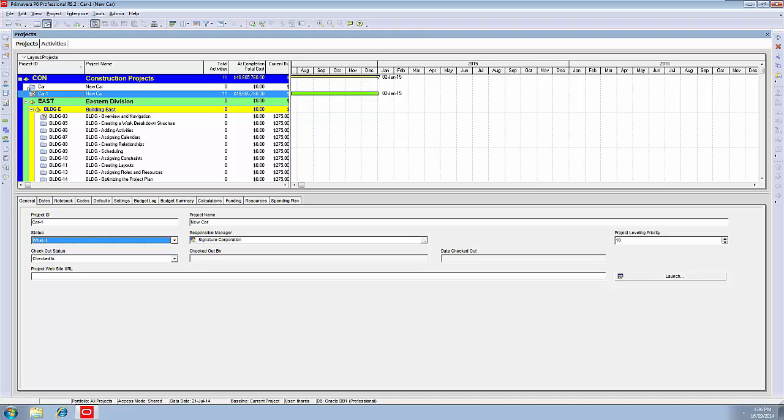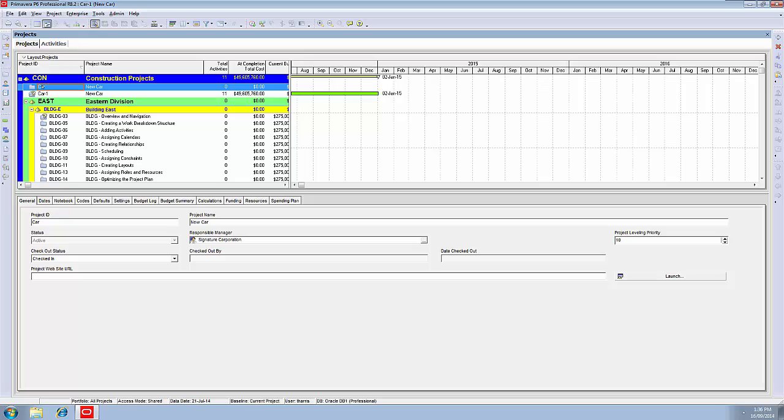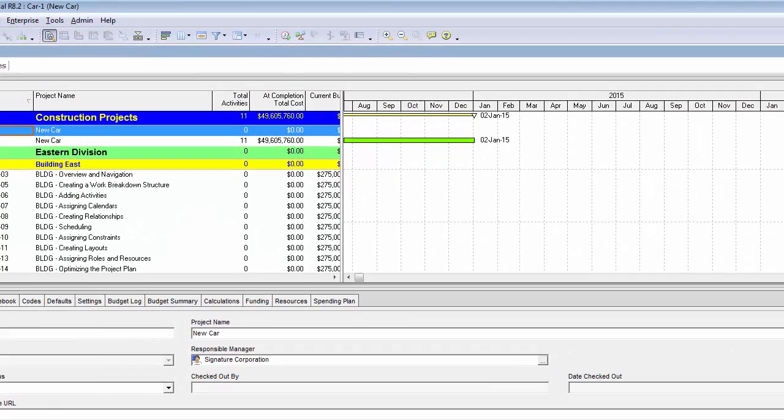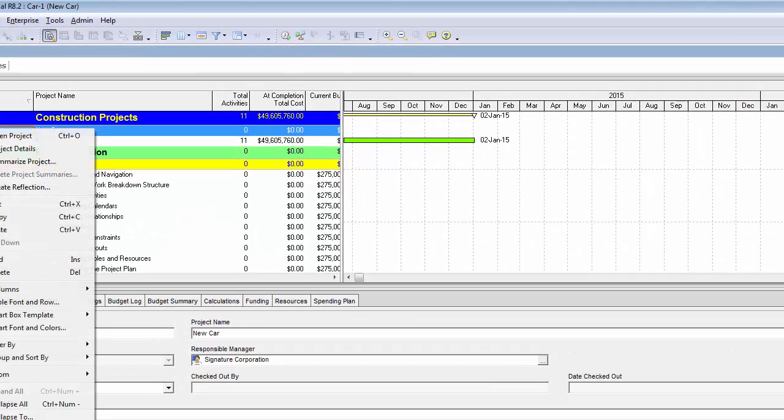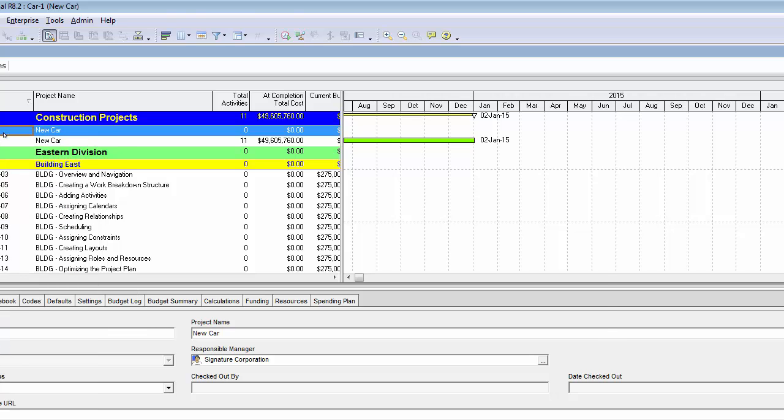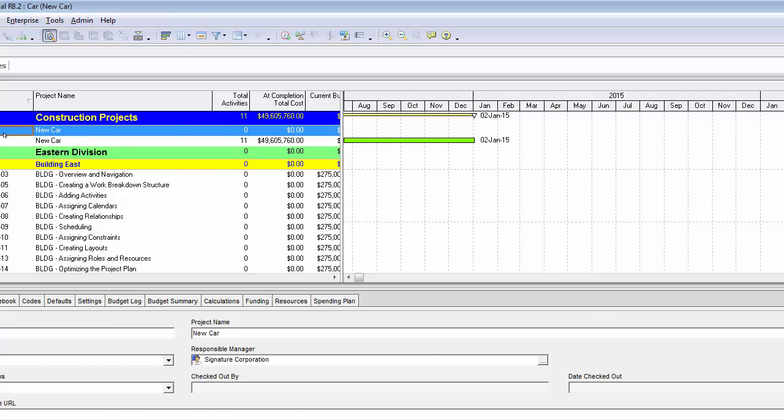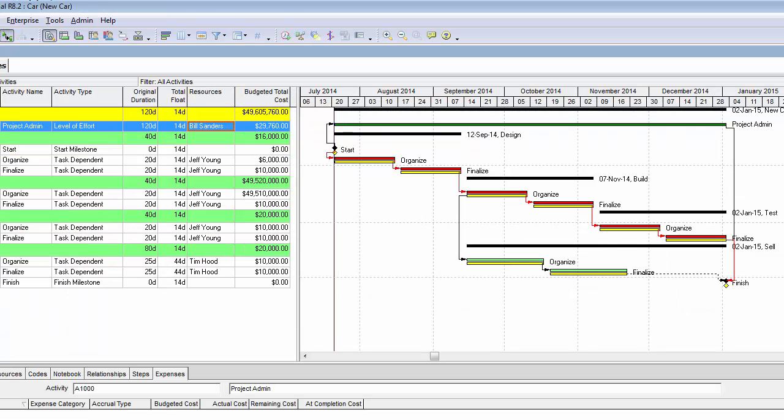Make sure car1 is now open. Status is now active. We can change from a status of active to what if. That means the resources in the copy will not be double-counted whenever we do resource analysis in the future. Notice that a yellow question mark goes over the project folder to give us a visual indication that it is indeed what if. We've got our copy and it's in the correct status, so we can now reopen our original.